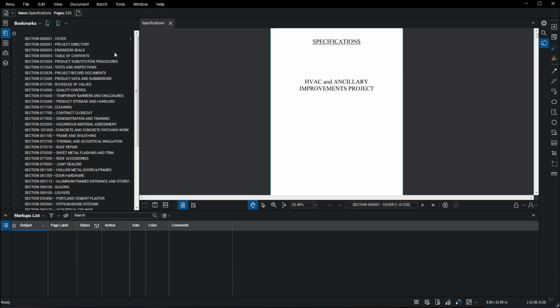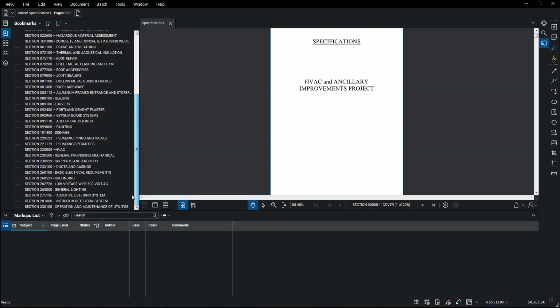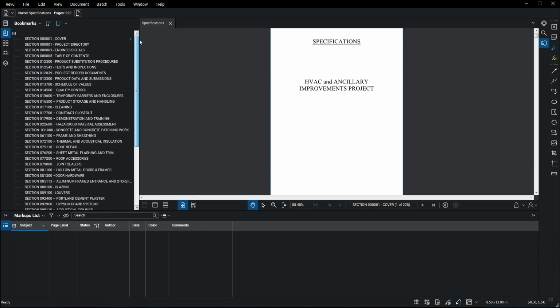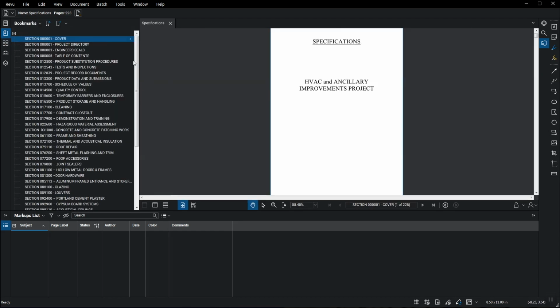Review native PDF file. Go to the Bookmarks tab and review the bookmarks generated. Confirm that each section is bookmarked and that there are no more than 2 bookmark levels created. Audit Bookmarks. Select Bookmarks at the top of the window and select Audit Bookmarks. Confirm there are no broken bookmarks. If broken bookmarks are found or anything has loaded incorrectly, delete previous bookmarks and create bookmarks using Bluebeam.